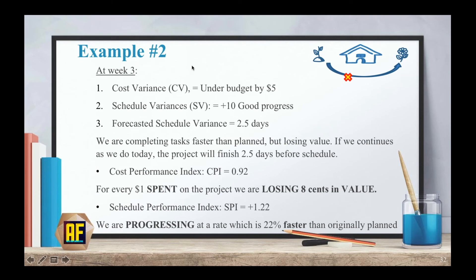Here are the answers for the second example. The cost variance is bad — we got a negative answer, so we are under budget by $5. The schedule variance was plus 10, so we're making good progress, and we should be 2.5 days ahead of schedule according to the FSA. This means we are completing tasks faster than planned but losing value. For every dollar spent, we are losing 8 cents in value — note that we lose 8 cents, not 92 cents. The SPI was 1.22, meaning we are progressing at a rate 22% faster than originally planned.